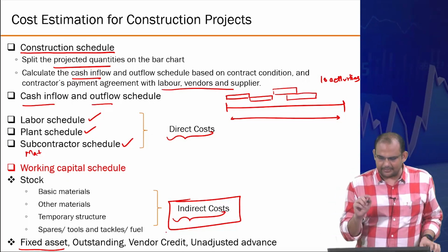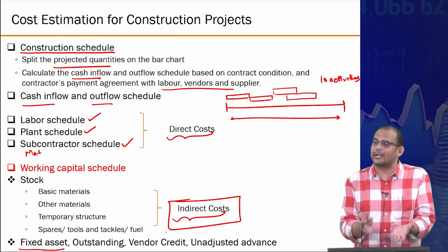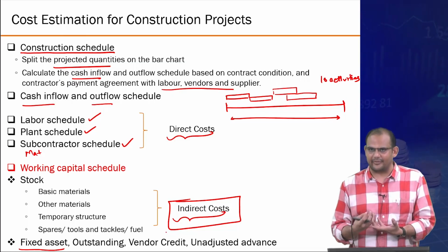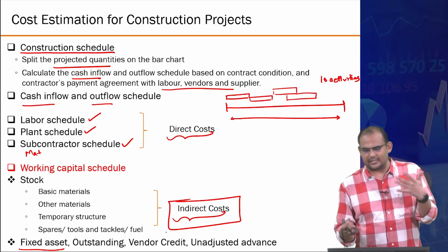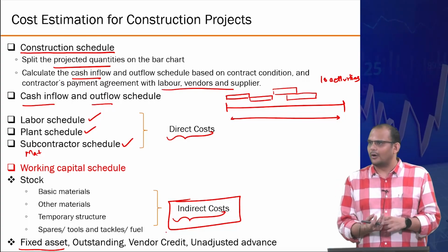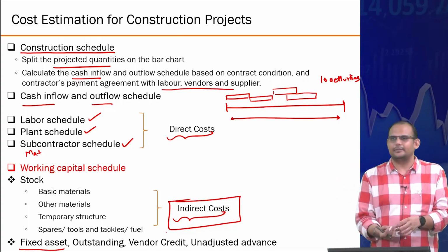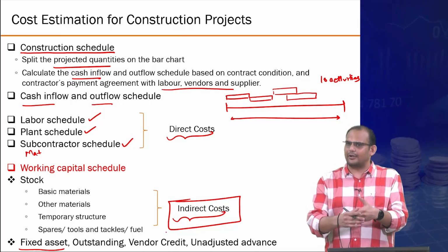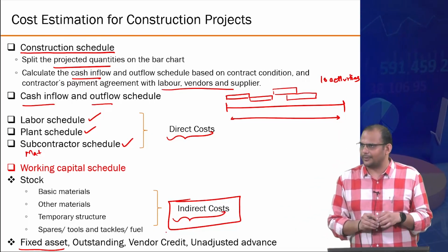Sometimes it also depends upon what you define as direct versus indirect, or how rigorous you want to be in this exercise. It also depends upon the relative volume. For example, if your direct costs are already about 80-90% of the total, then it's okay. You can accept that, because not knowing where the indirect cost is going is not significant, since 90% is easily accountable.